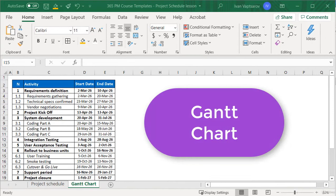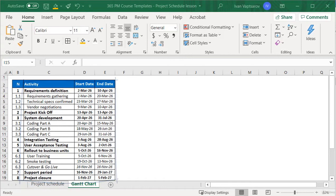In a Gantt chart, the columns are organized as a timeline, with calendar days, weeks, or months. Let's use months for the frequency and see what our Gantt chart will look like.